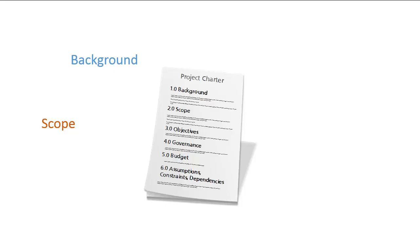Will your team design and build the product? Will you test it? Will you market it and sell a certain number of units? The key here is to try and define the boundaries of your project. What is the project team responsible for? Where does the project begin and end? And to that end, sometimes it's important to explicitly spell out what your project team will not do, if there's any possibility that there could be confusion.